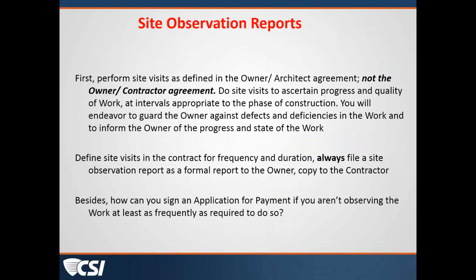Yeah. A lot of times I go to those meetings and you'll have the sales rep from the subcontracting company there. He may have some value to add, but what you really need is the person that's going to be out there putting it in, not the person that sells it to you. That's right. And in a project this size, often there are mock-ups that might be required given the extent of work involved in this project. That might be another opportunity. And if you include those in your specifications, be sure you get them.